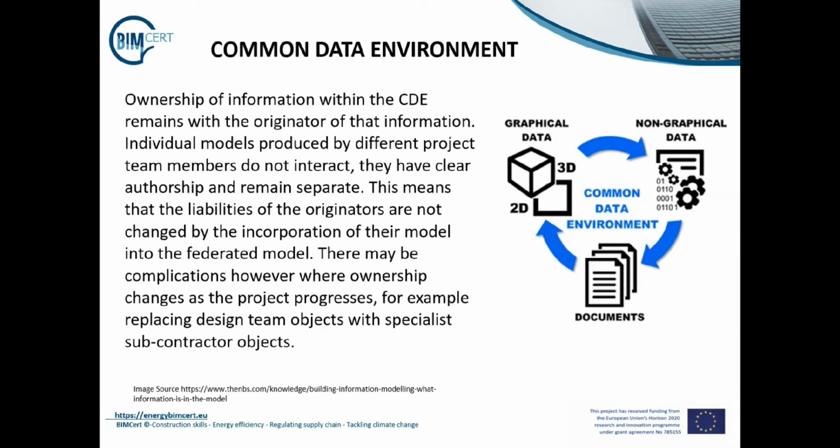Ownership of information within the CDE remains with the originator of that information. Individual models produced by different project team members do not interact. They have clear ownership and remain separate. This means that the liabilities of the originators are not changed by the incorporation of their model into the federated model. There may be complications, however, where ownership changes as the project progresses, for example, replacing design team objects with specialist subcontractor objects.